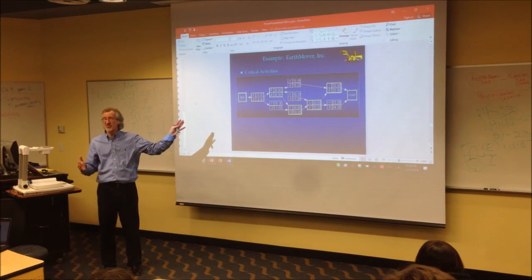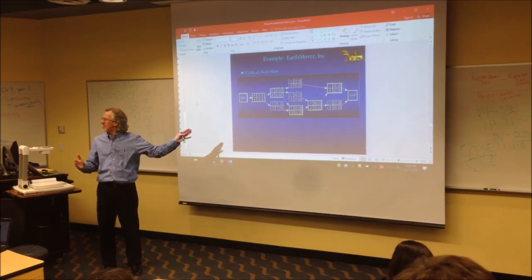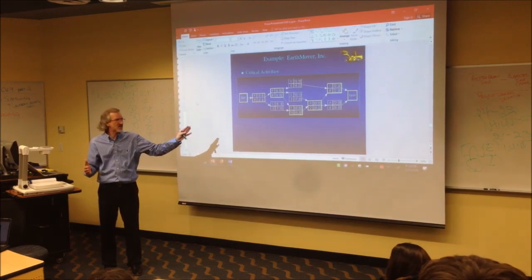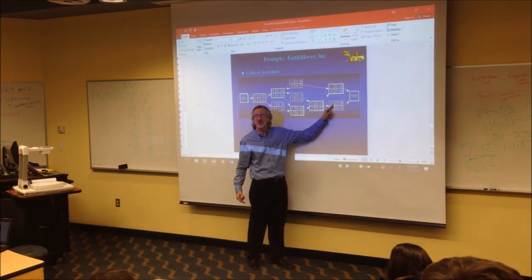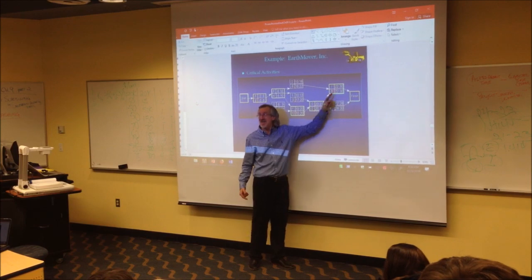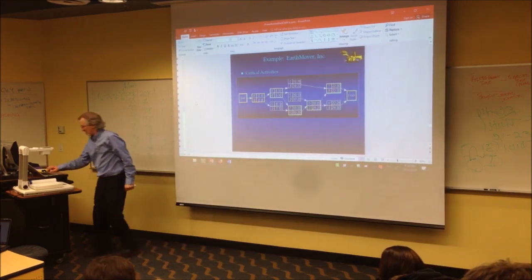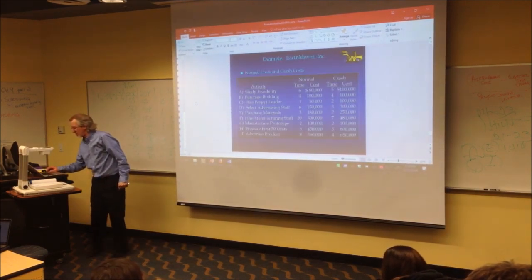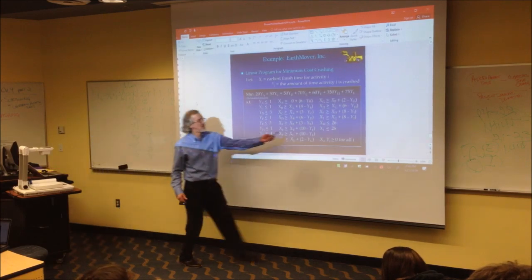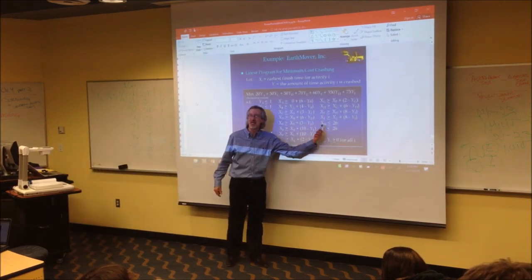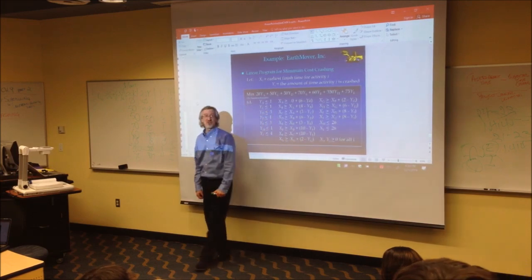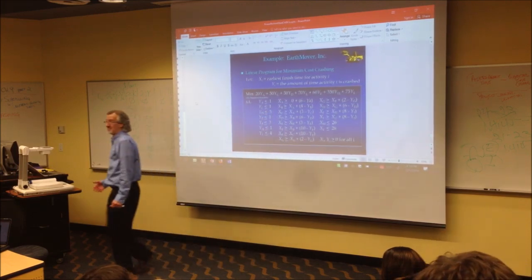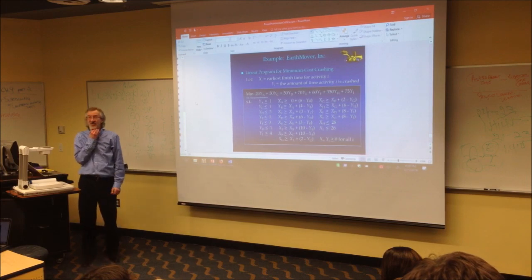Now, this is supposed to take 30 weeks, I think. We're trying to get it down to 26. So we're going to make sure x sub H is less than or equal to 26, x sub I is less than or equal to 26. These are those last two constraints right here, x sub H and x sub I, because they go to the finish. That's how you set this up. That's it. It's almost too easy now.